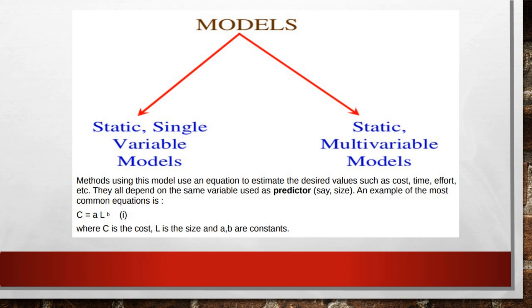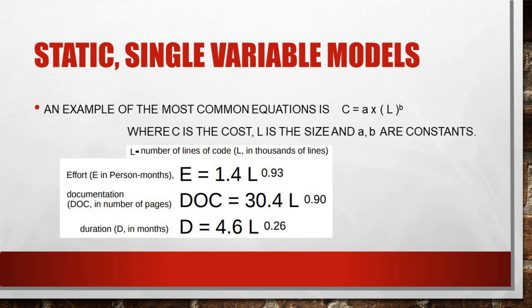The most common equation in both static single variable and static multivariable models takes the form C = A × L^B, where C is the cost estimation, L is the size (lines of code or function points), and A and B are constant values based on either the static single variable or static multivariable model.